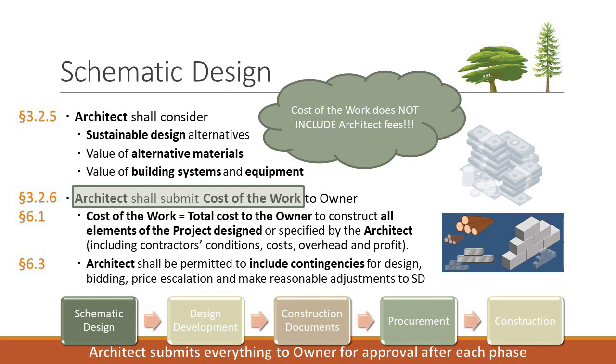and then they come back and they say, I don't like this, I need to change this, I need to change that. Well, you're already 3 weeks into doing design development, and if they haven't given the approval, you can't go back and say to the owner, well, I've already spent time, I've got draftsmen working on it, I got my junior designers working on trying to take those schematic designs to design development, and now you're changing the program. Well, that's because you went ahead too fast.